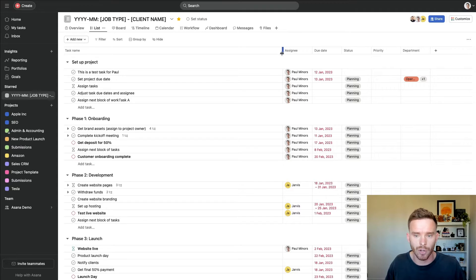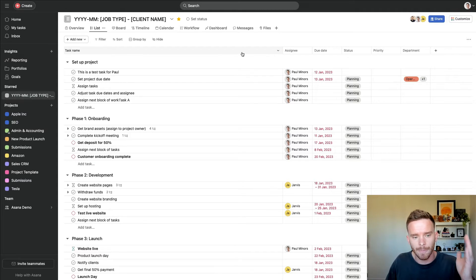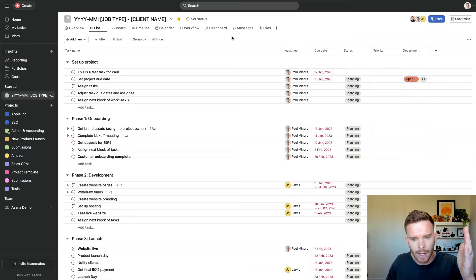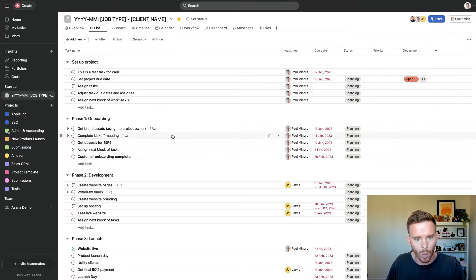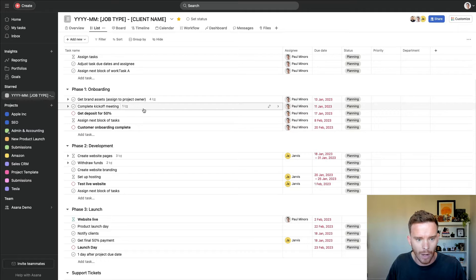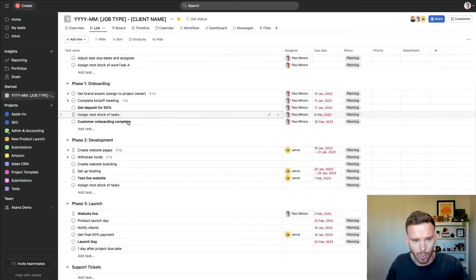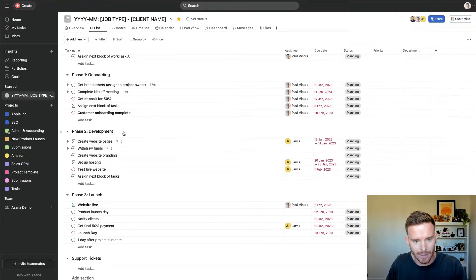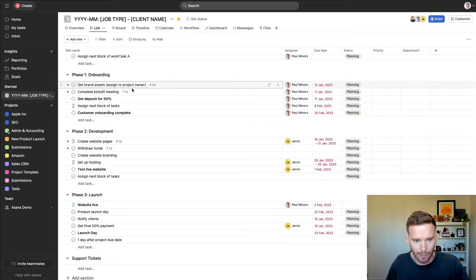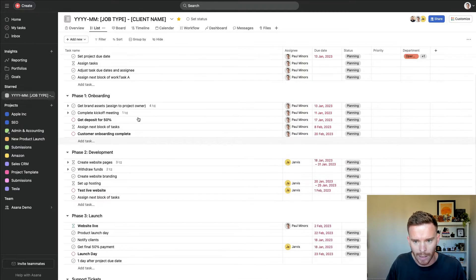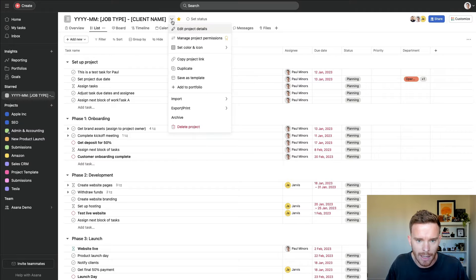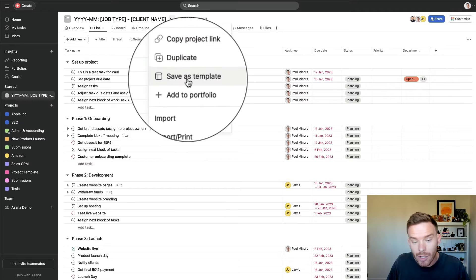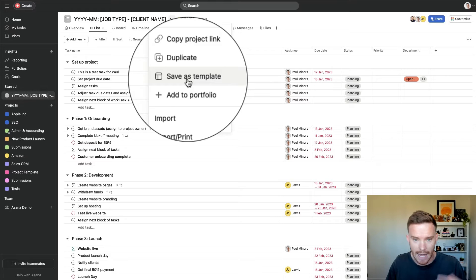To create your first project template, you can do this a couple of ways. Either if you have an existing project like this, so here's one that I've already set up for how to manage a client, I've set this up with phases for the major phases or stages of the project. I've got my tasks and milestones all in here ready to go. And if I come to the project menu, I can choose to save this existing project as a template and add it to my list of templates.